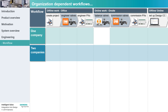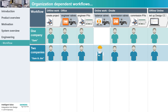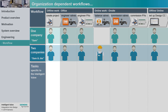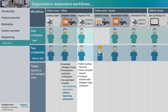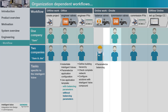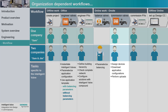In the first workflow, SAM's company is able to commission the complete system. In the second workflow, the company Jim works for is responsible for balancing the hydronic system. After SAM creates a new project, he parameterizes the related intelligent valve configuration. In the first workflow, SAM uses the application template with balancing parameters. In the second workflow, SAM selects the template without balancing parameters because Jim will parameterize the hydronic system later. While SAM programs the PX primary automation stations, Jim arrives on-site and sets the balancing parameters using the ABT Go app. In the final step of commissioning the intelligent valve, SAM downloads the application configurations.